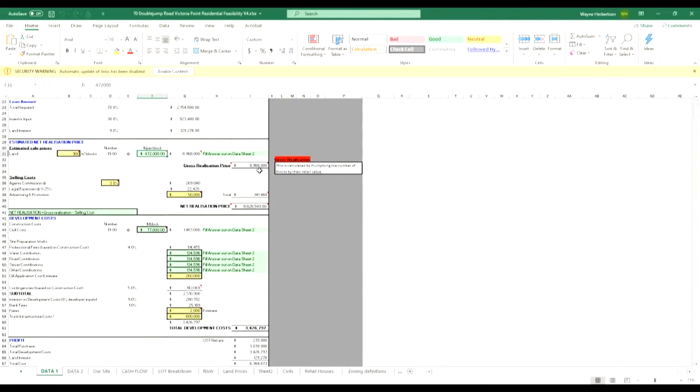So in other words, realised value in sales. But then we've got to look at our cost of sales. So agents' commission, if we pay them 3%, sometimes that might average only 2.5%, but we've been conservative again. We've only got 19 blocks to sell. So we said if we have to pay them 3%, it'll be 269,000 in commission, less the legal expenses and advertising and promotion. We've allowed 50,000 in there, and of course they'll put some advertising in with the agent's commission as well. And therefore our selling costs are 341,000, leaves us a realised price of revenue coming in of 8.626 million coming in on that revenue side.